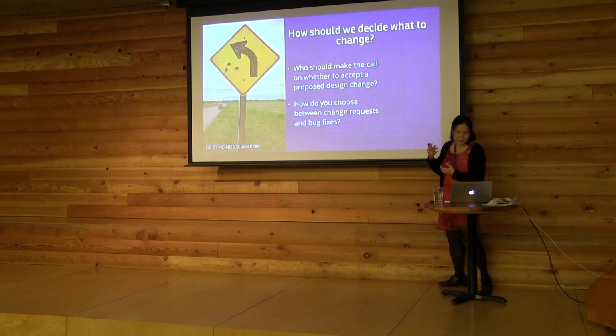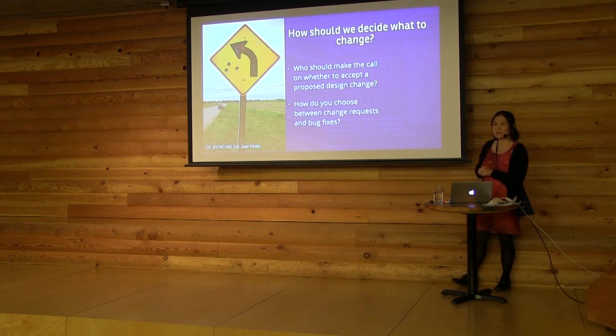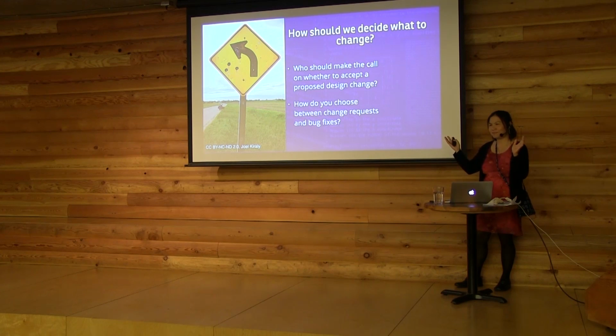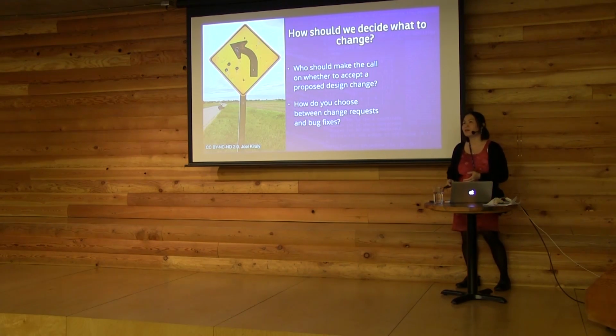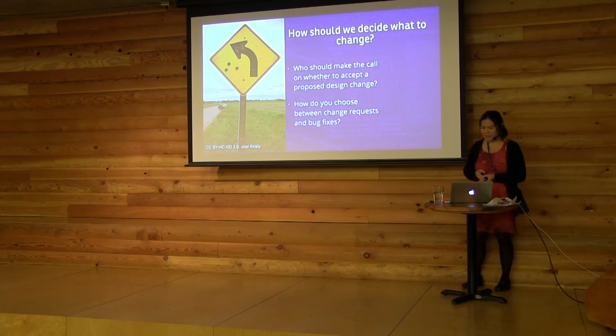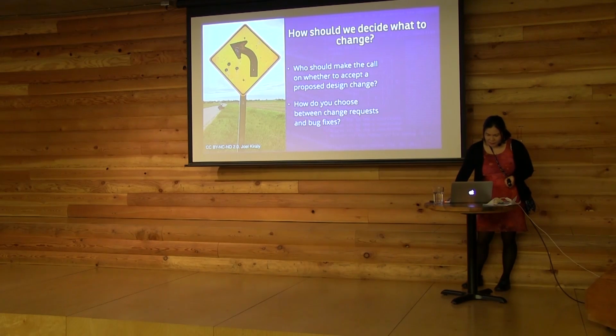And I would really recommend having someone designated to make the call on whether to accept a proposed design change. Nothing worse than being a designer saying, hey, can we do this? And no one decides. Or to be the person who comes in with usability testing results saying, hey, we've got these issues, and there's nobody to say, yeah, we should fix this stuff. Often things just don't get done because there's no one designated to do it. Okay, so just some thoughts on the process.